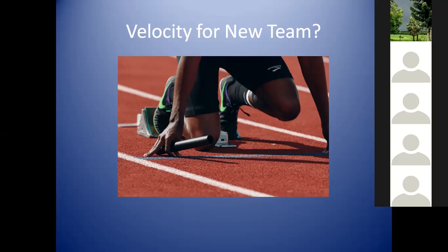And for that particular risk, you need to mention the mitigation plan: an additional buffer of so and so sprints has been added to manage this risk. But still, you need to point this out as a risk, because a risk is something that may or may not happen, right? So you need to tell that, because your team is new. And see, this situation generally happens, and we will be in a situation to provide some timeline because the team is new.